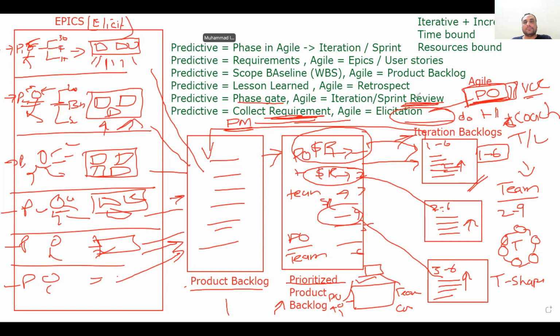One thing is remaining in this slide: the retrospective. After every review meeting, before starting the new sprint, we do the retrospective, which is writing lessons learned. This is the thing that yesterday we were arguing about. This is 6 days, this is 8 days, this is 10 days. Now we have finished the sprint and you found out what it actually was. So now you update the lessons learned: for this task, we will not do 8 or 6, we will do 5. This is enough.